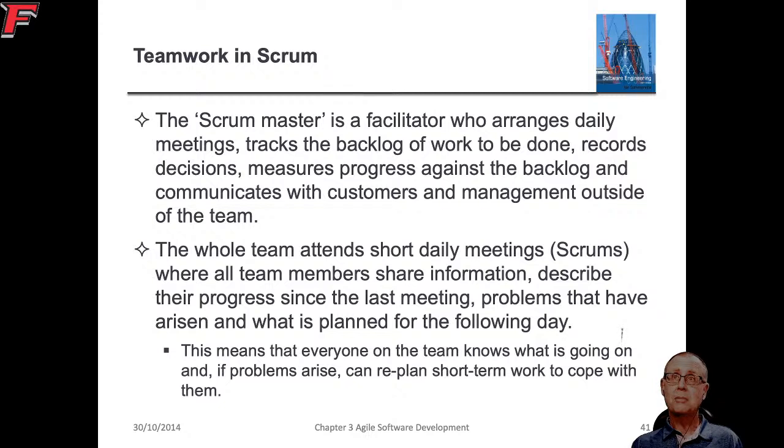Just talking about the Scrum Master, the whole team needs to attend those short daily meetings. They should be short, no more than 5 to 15 minutes long. Again, I usually call them a stand-up, because if everybody's doing it in person, I make everybody stand up. Because if everybody sits down, they get too comfortable and things take longer. If you're standing up, you want to get back to your desk, so stand up to do it.